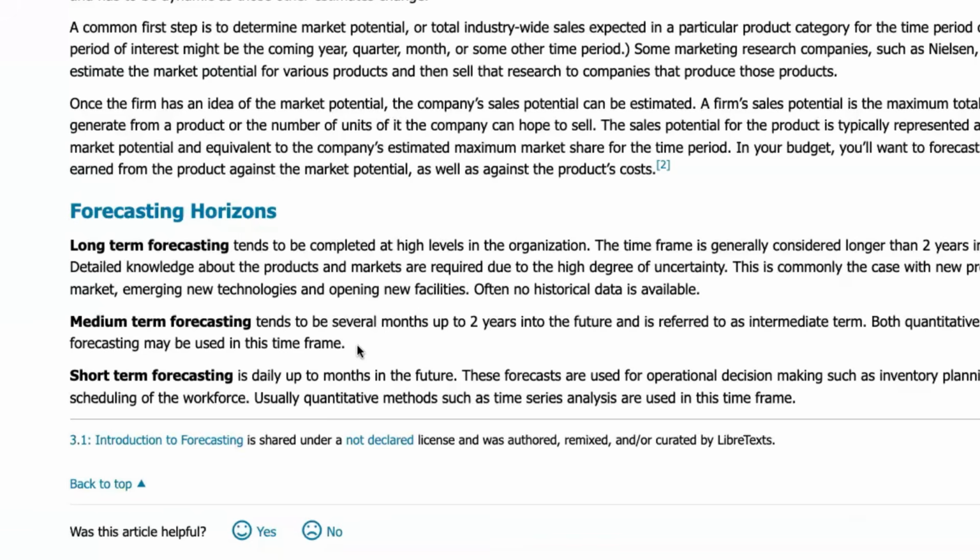In 6 months, we will target only North Carolina and launch it there. Once we get the feedback, we can launch in another 10 states. And then in phase three, we launch throughout the US. So phase one, only North Carolina. Phase two, 10 different states. And phase three, throughout the US.